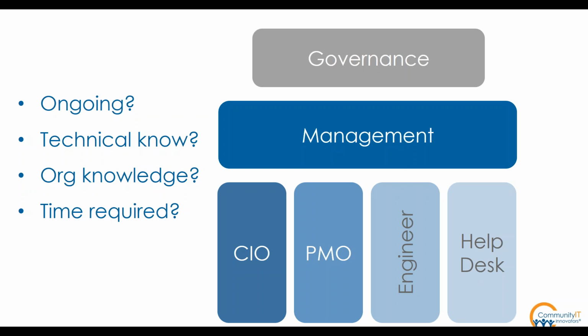But a PMO, if you're rolling out a lot of IT projects, and if rolling out new IT solutions is a fundamental part of the organization, then it may make sense to invest in a PMO in-house. But if you're only deploying new IT solutions every 2 or 3 years, then that may be a function that makes more sense to outsource.